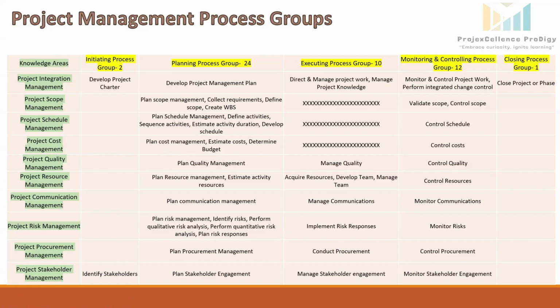Cost management plan will be developed, how the cost will be estimated, budgeted, managed, and monitored and controlled. So output of this activity will be cost management plan. Under the cost estimation activity, using various estimating techniques, cost for labor, material, equipment, services, and facilities will be predicted. So output will be the cost estimates. Finally, under determine budget activity, all the cost estimates will be aggregated to come to the budgetary figure. So cost baseline will be created that will include authorized budget and contingency reserve.